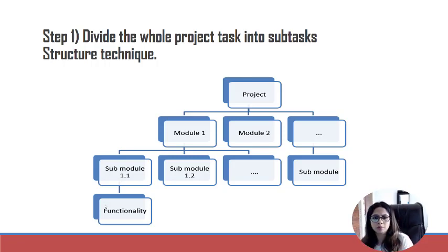Now you took one module, concentrated on it and broke it further into sub-modules. You took the other sub-module and broke it further into tasks and subtasks and distributed it amongst the team members to start working on it. So if it's a small piece of work, it's easy to work upon.